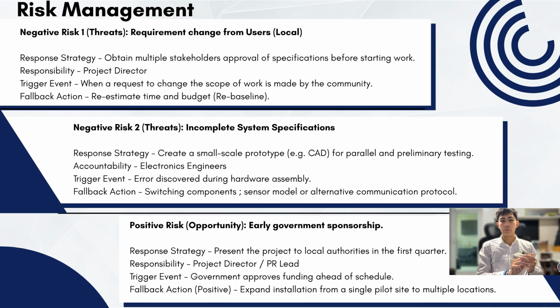Now, we have risks that we have identified so far, comprising negative risks, or so-called threats, and positive risks, which are the opportunities. Two of the most major threats are, first, requirement changes from the user. If there is a sudden change that can be detrimental to our project, we're going to have someone responsible for that task, which is the project director. We're going to have to re-estimate time and budget, aka re-baseline things.